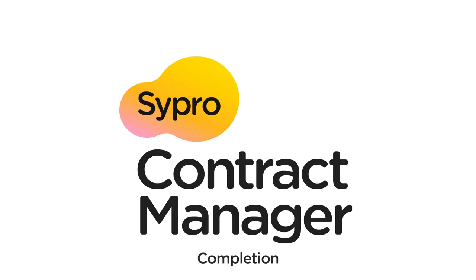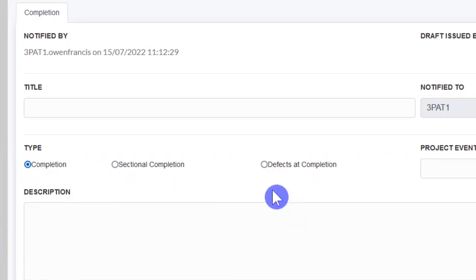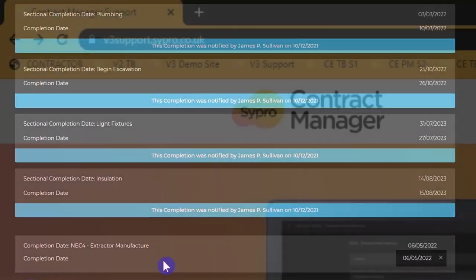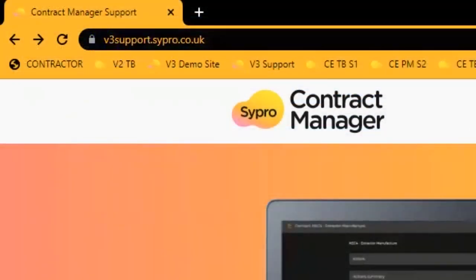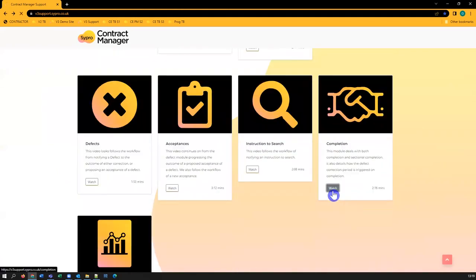Completion. In version 2, you could notify completion, defects at completion, or, if applicable, sectional completion. In version 3, if applicable, you notify and certify all sectional completion prior to notifying completion. You can find out more about the completion module from our support site in the completion video.